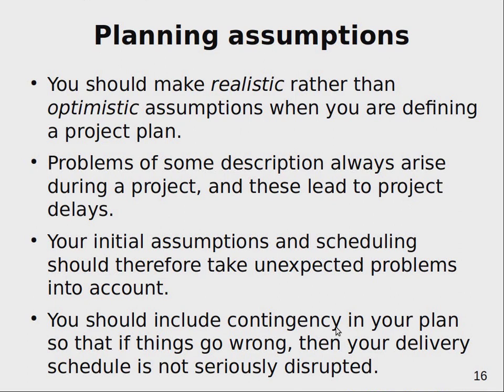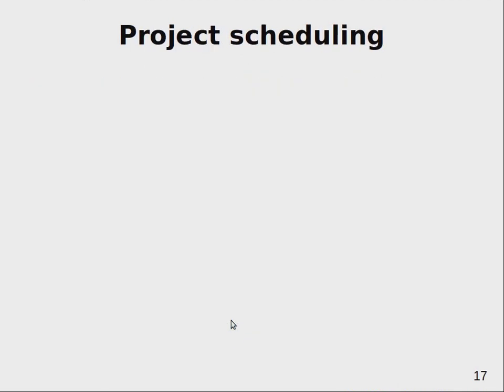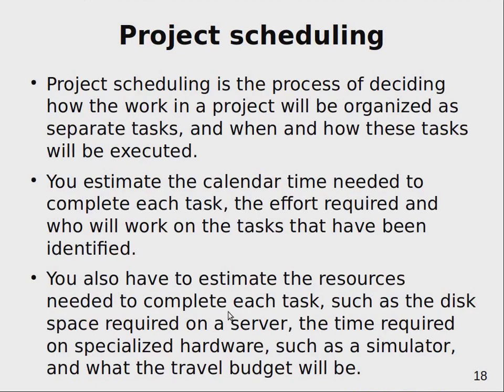So you shouldn't be planning for 100% workload, and you shouldn't plan for 5 days in a week for every week, because you need to remember that somebody may go on vacation and you should be able to plan for vacation, but for larger projects you can't plan exactly if somebody gets sick, etc. So there should be some places where you can earn back some time because you already have planned for some free time, either by not putting 100% workload, or putting 100% workload and then some 3 days in between.